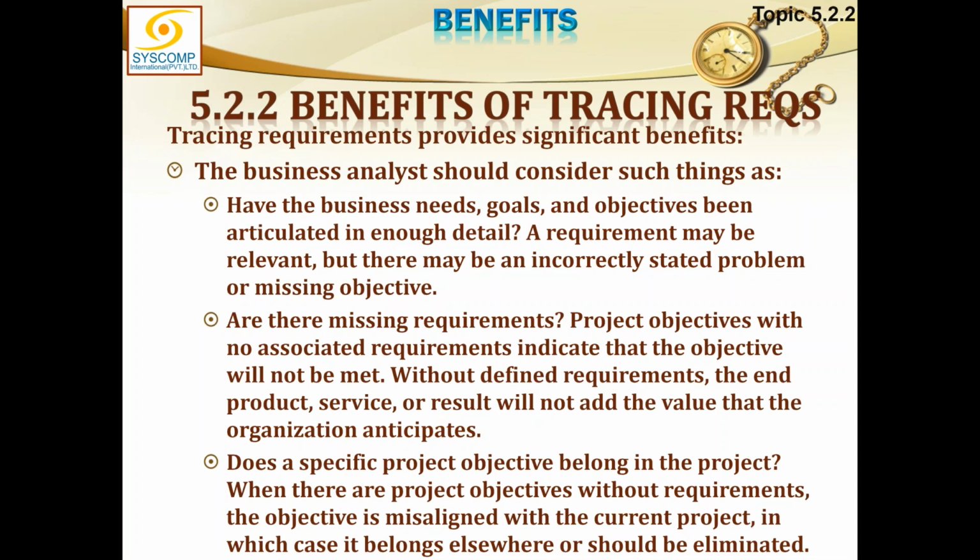Then, are there any missing requirements? Project objectives with no associated requirements indicate that the objective will not be met. I hope you understand this. We have a project objective, but there is no requirement which is trying to fulfill that project objective.